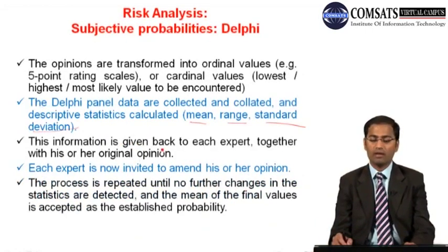So the information is given back to each expert together with his or her original opinion. Each expert is now invited to amend his or her opinion. The process is repeated until no further changes in the statistics are detected and the mean of the final values is accepted as the established probability.